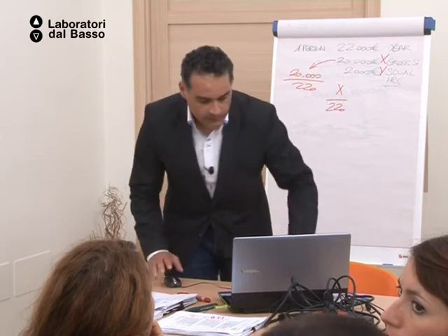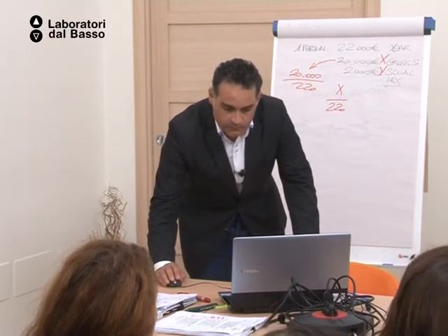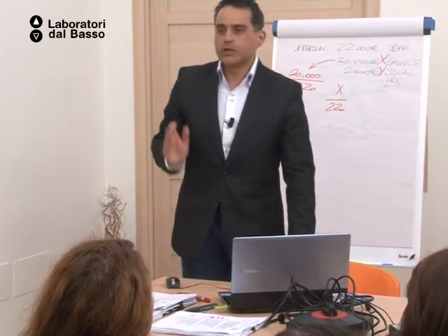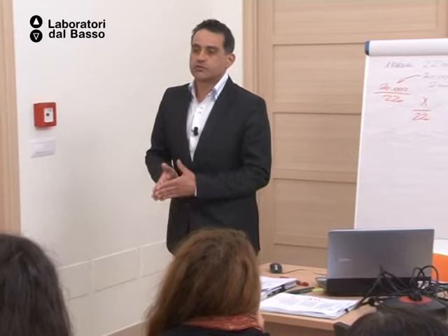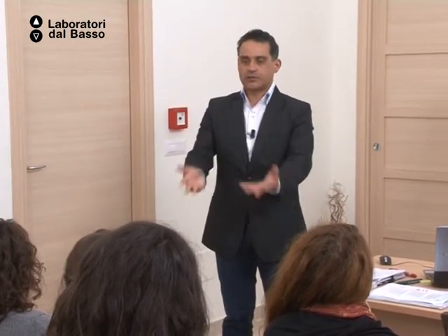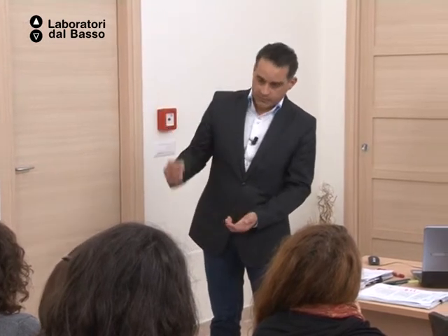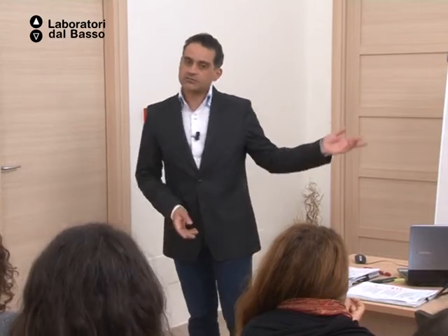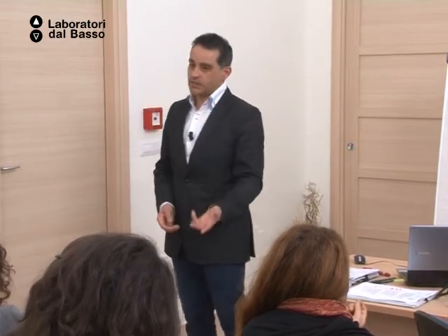Within this program, Grundtvig Multilateral Project, it's a rule, you must go to Brussels twice a year to report. There is a bunch of reports that they ask you to bring for them to follow what's going on, the spending, I mean, everything. So this is inevitable. You have to go there twice a year. And since you're working on a 2-year project, you will have to go four times.